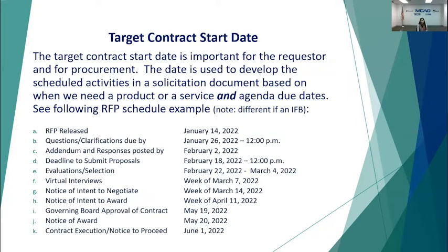So normally you're coming to procurement because the items we will procure, the service we will procure, requires board approval. I do also work on thresholds under 30,000, but mostly procurement is involved when the item or service is over 30,000 and we're going to need board approval.